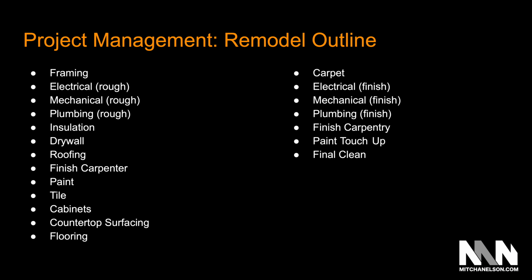So framing, electrical, rough mechanical, rough plumbing, insulation, drywall, roofing, finish carpentry, paint, tile, cabinets. And finish carpentry, by the way, is like your moldings, your baseboards, your casing around the doors, your doors themselves. Then after that, paint, tile, cabinets, countertops, flooring, carpet.